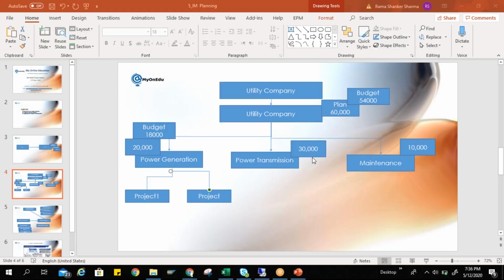This is the main reason. If you want to see the accumulated cost, you cannot see it at the project definition level directly, so for that you have to see the WBS. You define one parallel object with the project definition so that you have all the objects rooted in one place. That is the only reason. Otherwise, you can create multiple WBS elements also. The system will not stop you. It depends on the nature of your project.